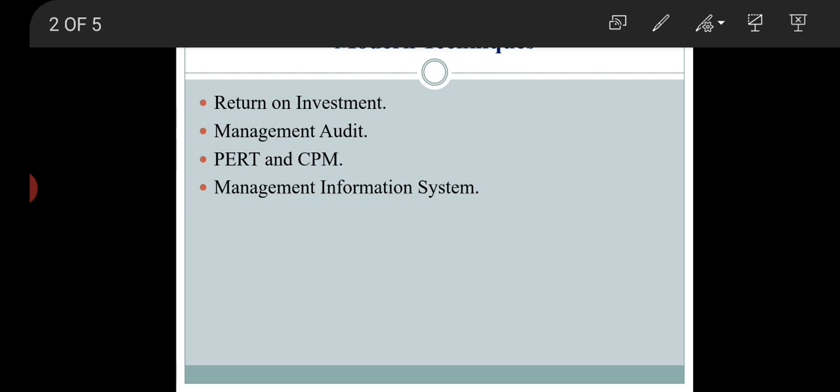So in these 6 steps, how the work is going to be done, which activities are to be undertaken, which work is to be done, the priority of the work is set down serially, how much time is required for each of the activities is decided, what would be the budgetary estimate for each activity is decided, and accordingly the PERT network is being designed, where you get a design 1 2 3 4, you can name those activities, and accordingly you will come to know which activities are to be undertaken to complete the project, how much time is required, and how much money is required, so that you can get it at a glance, you can get an idea.